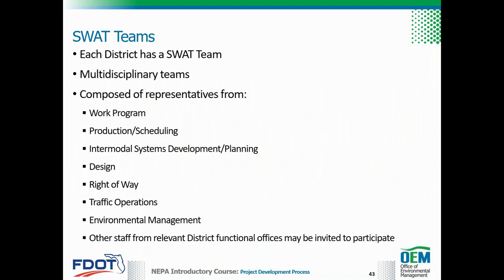Each district has an established SWOT team composed of cross-functional, multidisciplinary staff experienced in project delivery. SWOT team members are experts who are involved at key milestones during project planning prior to development of the PD&E scope of services to ensure that project decisions get broad input and early support.